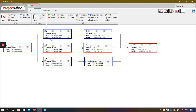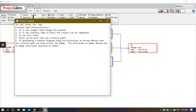So that does not mean that B, E, D, G are less important. What it means is that a minimum of 24 days is needed for the project's completion. So the longest path is taken as the critical path — and it is a little bit of a confusing way of saying it, but this is how generally the literature states it — that it is the shortest time in which the project can be completed.